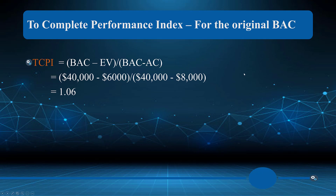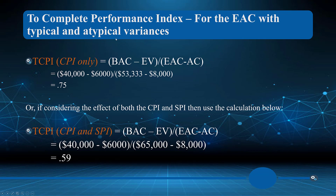The to-complete performance index (TCPI) for the original BAC takes BAC minus EV, divided by BAC minus AC. We arrive at 1.06, meaning to finish the project at the original budget, we would need to be more efficient going forward — which, given current performance, means we're likely going to end up over budget.